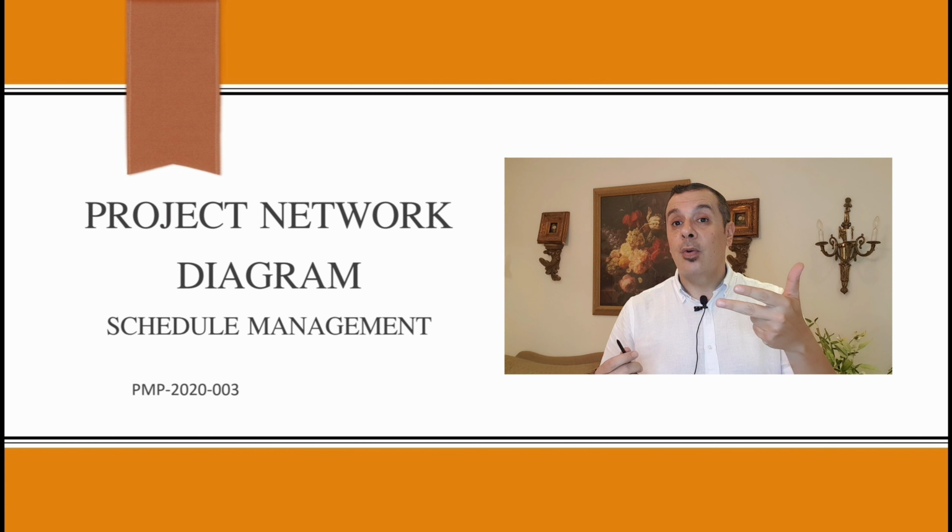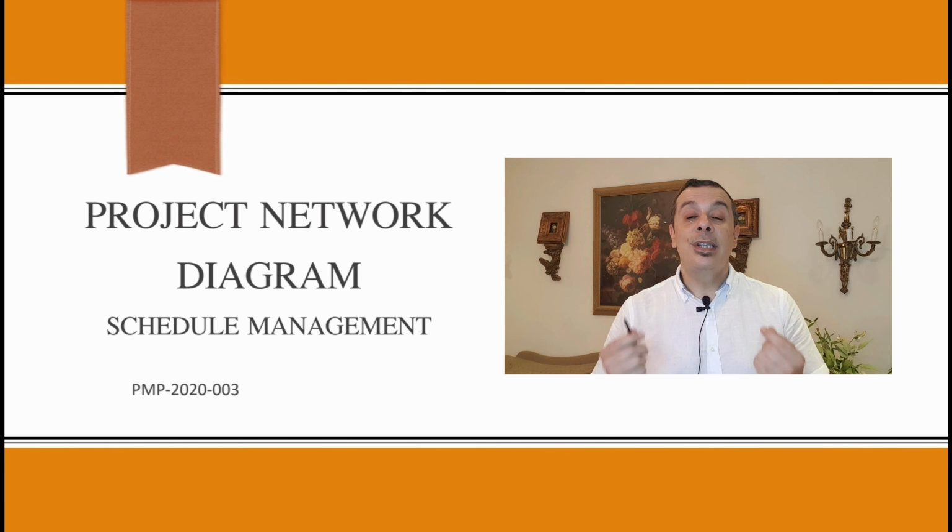videos. Today we're going to learn one of the important tools that every project manager has to know that will help him to develop his project schedule. Why? Because the schedule is considered to be one of the project baselines. We have three baselines in every project: scope baseline, schedule baseline, and the cost baseline. And the project manager has to know the tools that will help him to develop these baselines. Why? Because these baselines are used later on in order to measure the performance of the project.